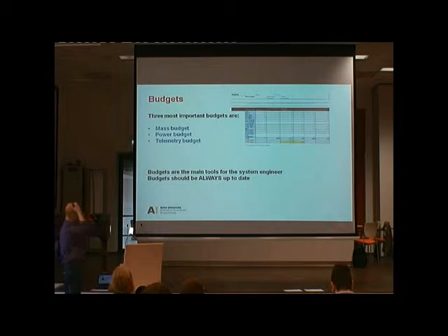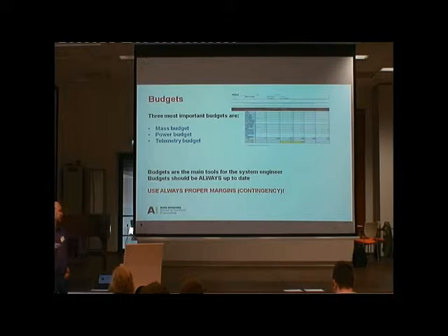Your budget should be, in a space project, always up to date and available for all the engineers in the project. And it's most important also to have margins. So if you start a space project or whatever kind of system engineering project and you make your first tables, use margins, contingency. That means that you know that your payload is going to be 400 grams, but you put in the table 460 grams. Because you know that these guys are going to forget something, they need bigger screws or whatever, and the mass can grow. So you have this budget buffer in the entire satellite. And all the space projects have been proving that you're most probably using up all your margins by the end of the day anyhow. So start with safe margins, and these margins are even documented and decided by ESA.